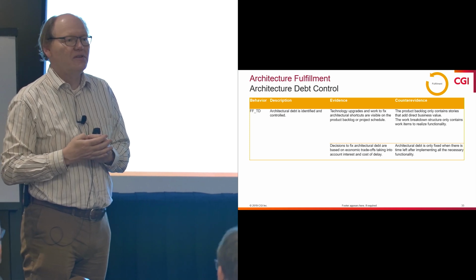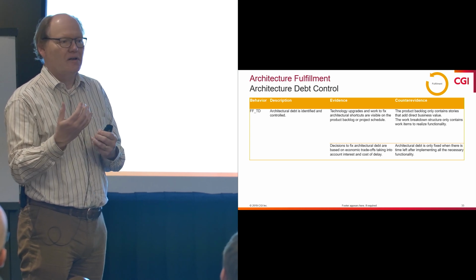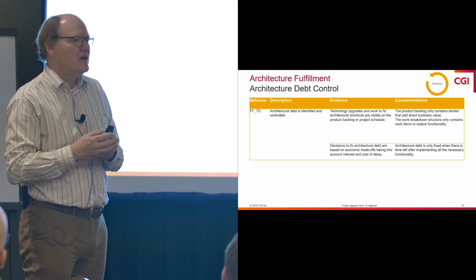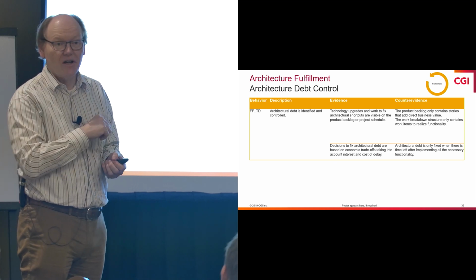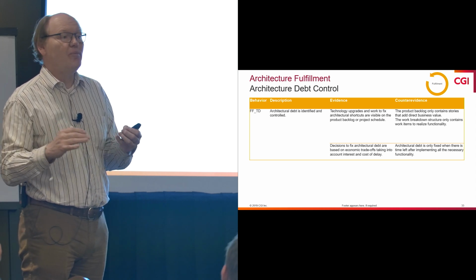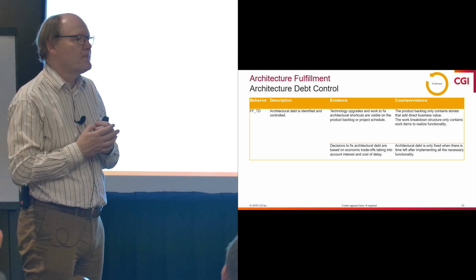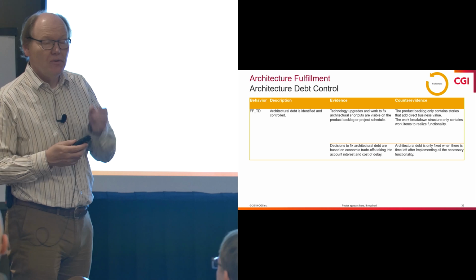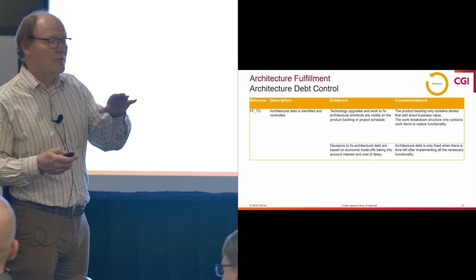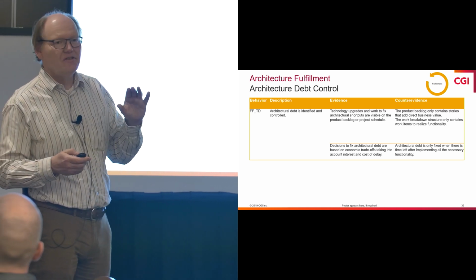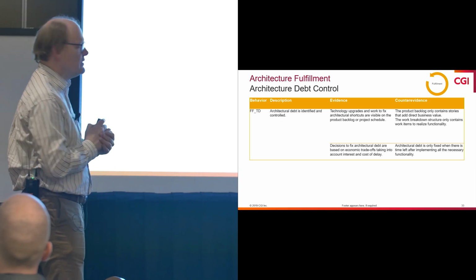The only problem is that in the way this is done in SAFe with planning poker cards, somehow the architectural debt and also the architectural runway stories always end up at the bottom of your backlog because they're underestimated. And SAFe knows this, by the way. If you look at the SAFe website, they tell you that you should reserve capacity for these enablers apart from the WSJF prioritization. However, that information is a little bit hidden in the SAFe website, so not everybody understands this. Okay, sorry, I got off track here.